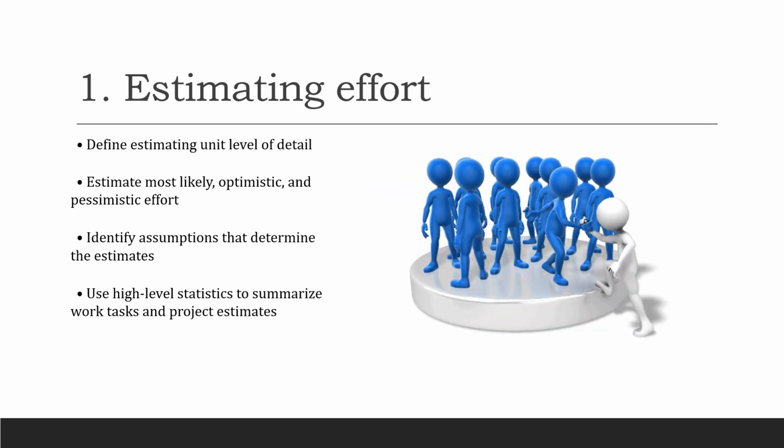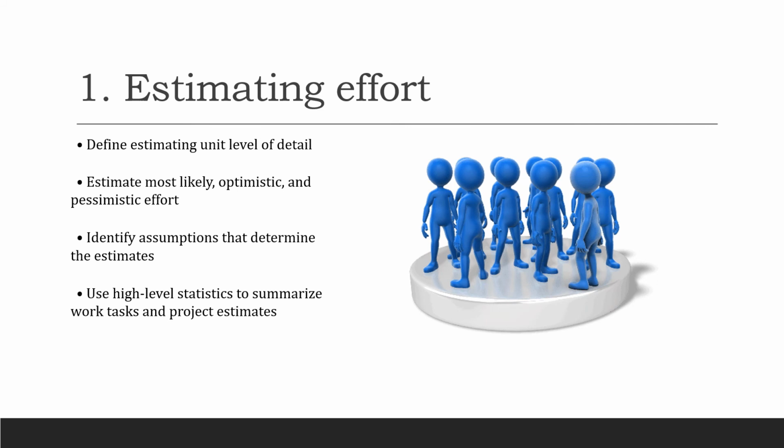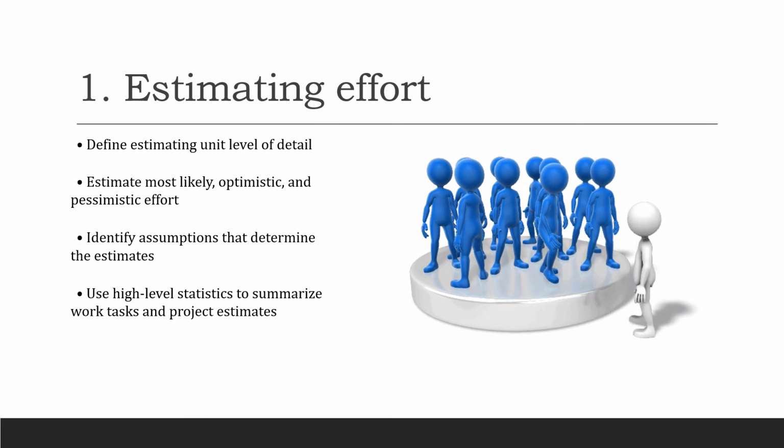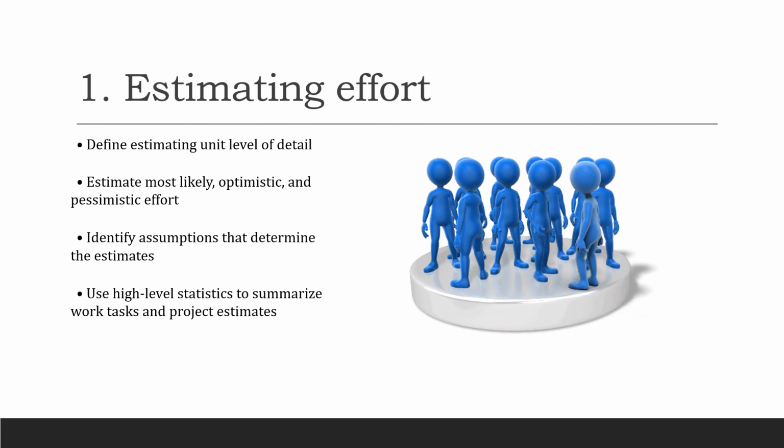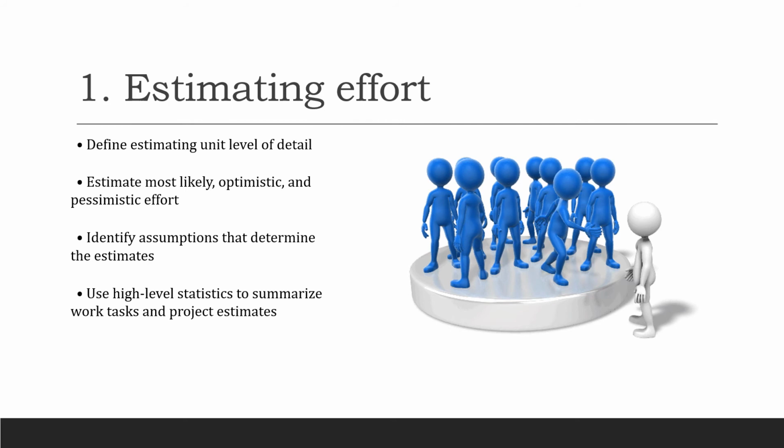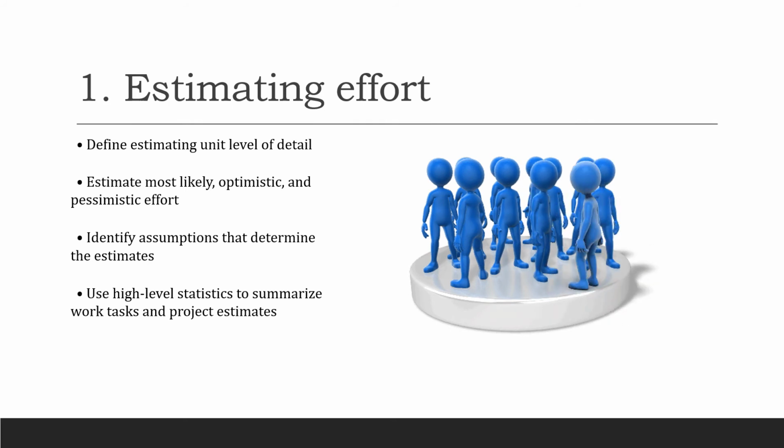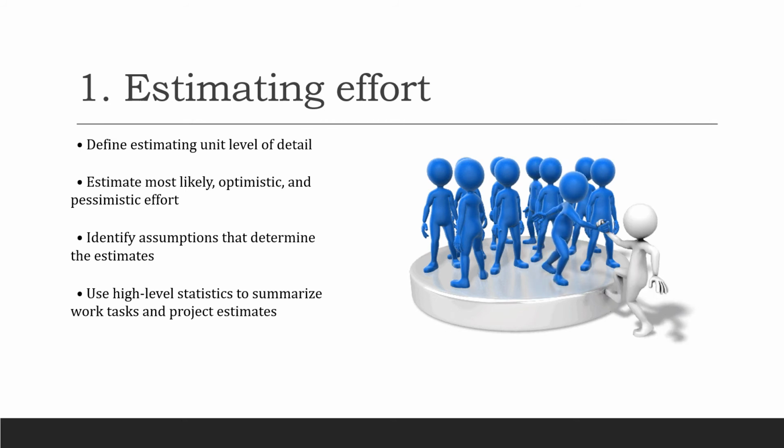Okay, estimating effort. In order to estimate effort, we already estimated the time. Now we're going to estimate effort. First, you're going to define the estimating unit and level of detail. Second, you're going to come up with the most likely, optimistic, and pessimistic effort.